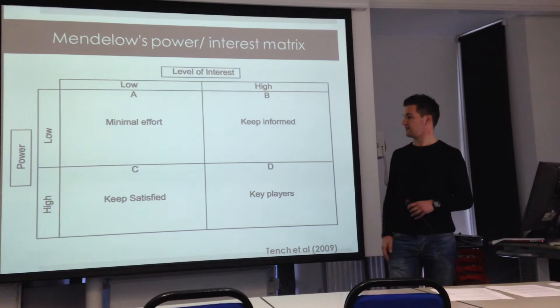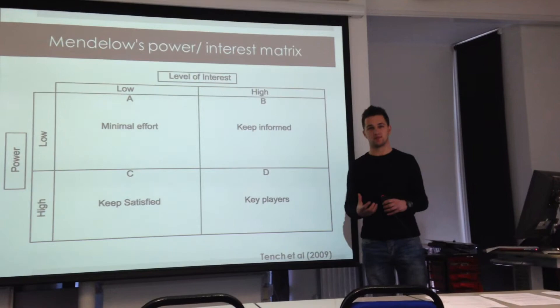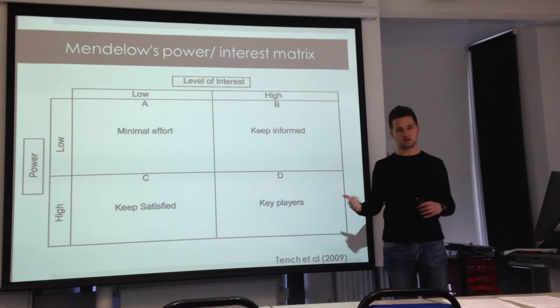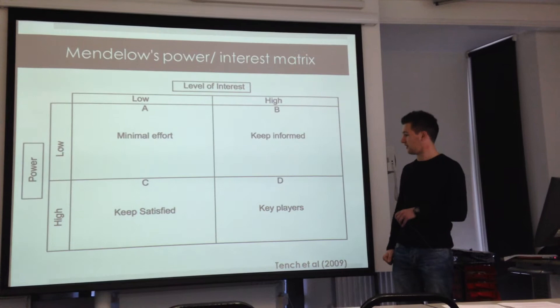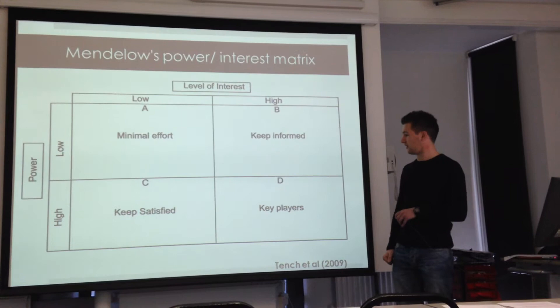For high power and low interest stakeholders, you keep them satisfied. You want to keep these people happy because they've got the power to do something — if they are made unhappy, their interest might suddenly increase and you've got more of a problem. And your key players, high power and high interest, you want to keep these people happy because they have both the interest and the power to really impact the project in a negative way.